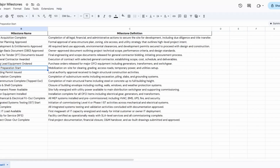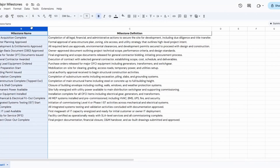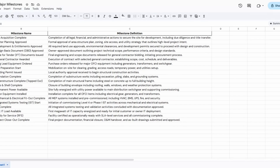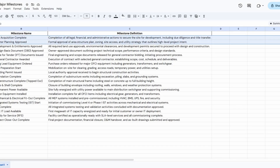Let's pull open an example of a major milestone sheet. What you'll notice here is I have a column for activity ID — this activity ID will be the exact activity ID that's in Primavera P6 on all of the projects. Then you have a milestone name and a milestone definition. The milestone definition is extremely helpful for people looking at what they should tie in as predecessors and successors. Here's a pro tip: don't number activity IDs sequentially — one, two, three, four. If you wanted to add a milestone between two existing ones, what are you going to do, name it 1.5? Put a couple digits in between each of your milestones and that'll give you a ton of flexibility.